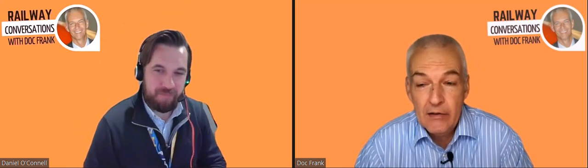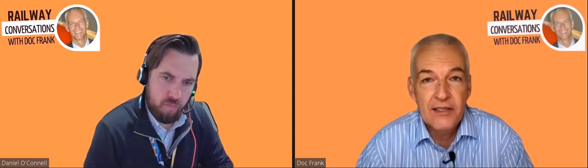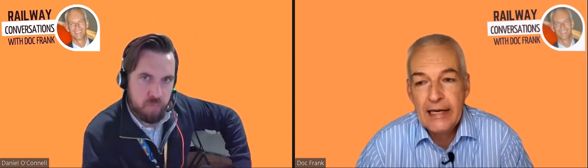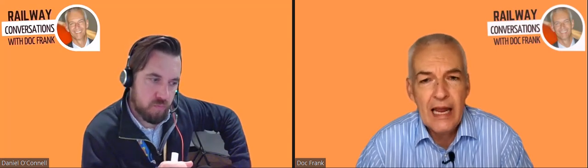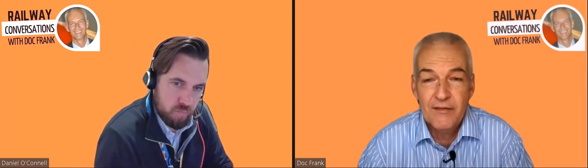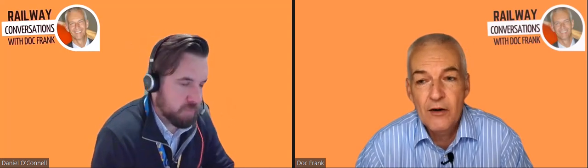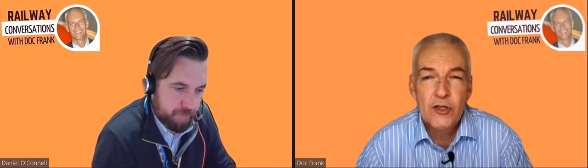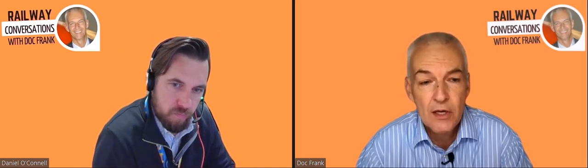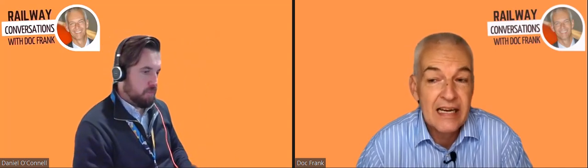The other thing, and that's probably the last thing about Dubai, is I could imagine Dubai is a fully unattended system. GOA4, Grade of Automation 4, for those of you who don't know the acronym GOA. And Dubai didn't really have a fallback system in the classical sense. So many railways that operate on GOA4 have some kind of a conventional fallback system with some simplified signals and stuff like that. But to my knowledge, Dubai didn't have any of that. So I could imagine that a majority of the testing, or a significant part of the testing, was really the testing of degraded scenarios. So what's going to happen? What's going to happen if something doesn't go right?